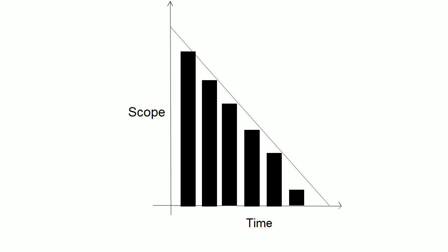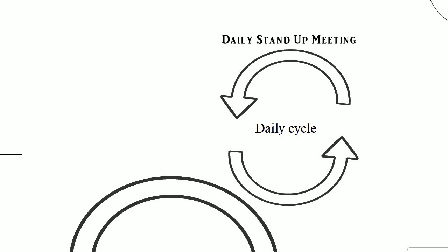The Scrum Master also reviews the Burndown chart with the team and tracks the completion of user story points. If a team commits to a certain number of points to complete during a given sprint, as they complete user stories, the total number of points should be decreasing, and that decrease in work scope is captured in the Burndown chart. So every 24 hours, there's a chance to validate that the sprint is on track, and after every sprint, there's a chance to course correct and validate that the larger release is on track as well.